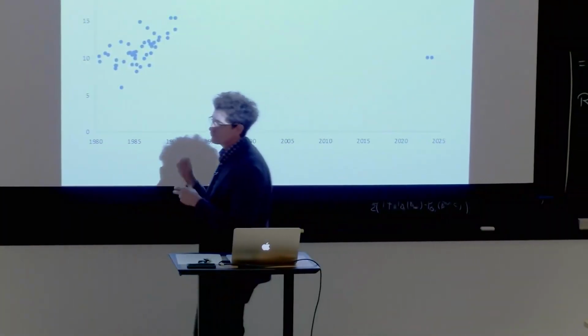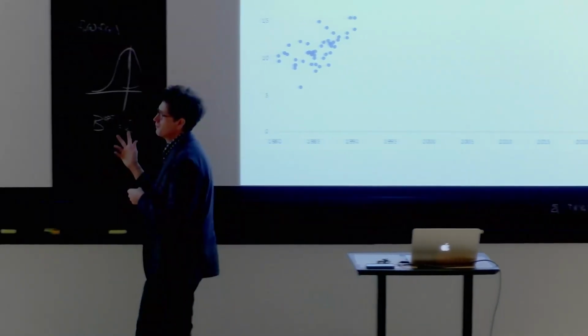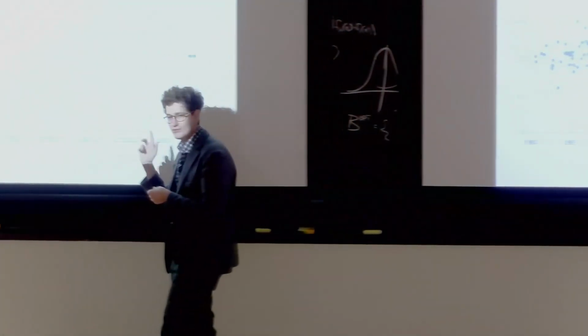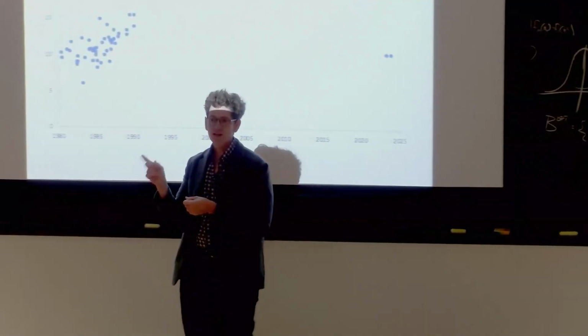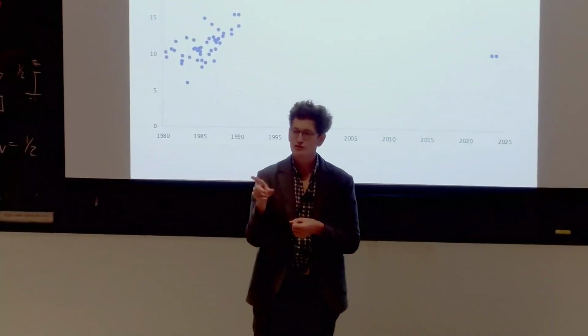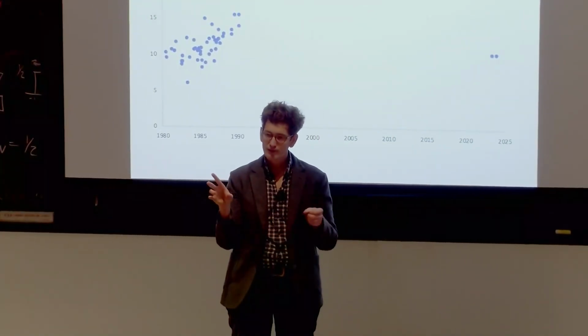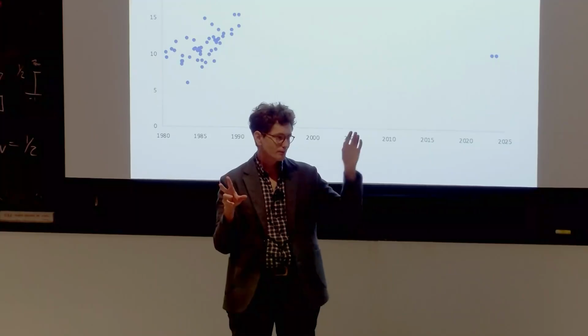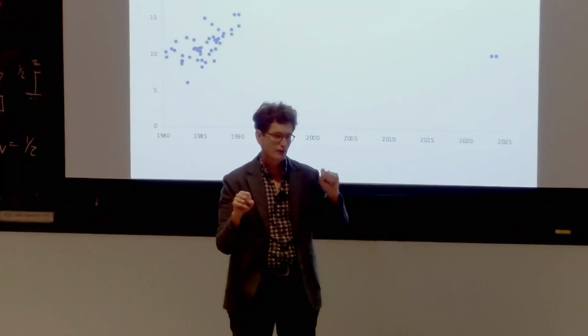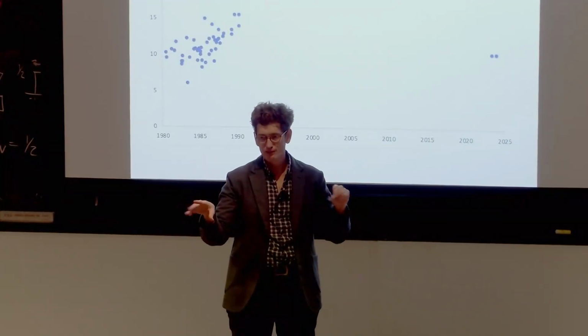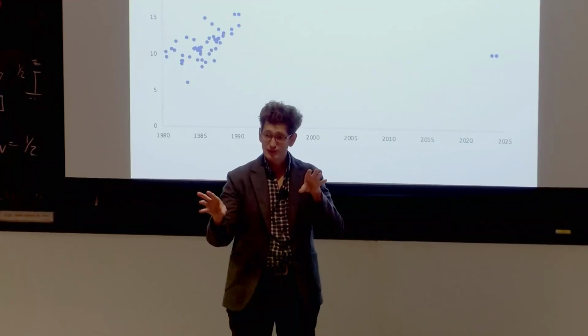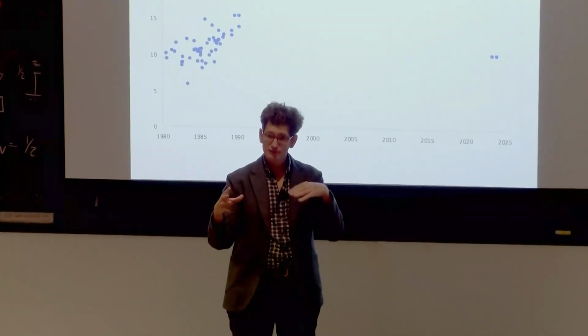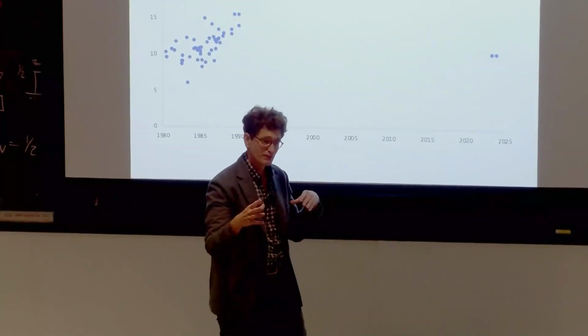So duration is a really useful measure. The reason it's a useful measure is that it's directly comparable between different countries. If someone takes 5 years to build a reactor, someone else takes 10 years to build a reactor, and those reactors are comparable, then we have some sense of country-specific variation.